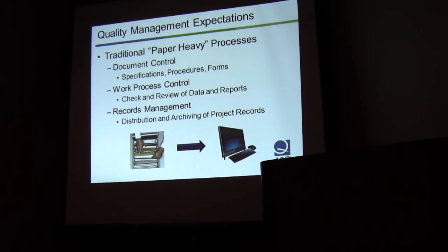It's so much easier for the client if they can get that report within 12 hours, 24 hours, something very close to when the material was laid down, because that way if something's gone wrong, they pretty well know that they've got to take it out. But even better, if everything's gone right, then they know that they can continue building on top of the material that they put down. So not just with paper being a lot of fun to process and taking time to process, the review process has just taken a while.